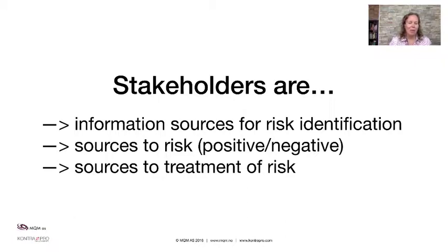Lastly, stakeholders may be your supporters in improving or handling risk. So any communication or forming alliances with stakeholders may vary, of course, but it may also be a tool to mitigate risk. An example would be involving workers in design and implementation of safety routines on a site or a factory. When you involve them, you form, first of all, alliances, but you also empower them to actually work safer. So by having good communication with these stakeholders, you get a safer workplace.